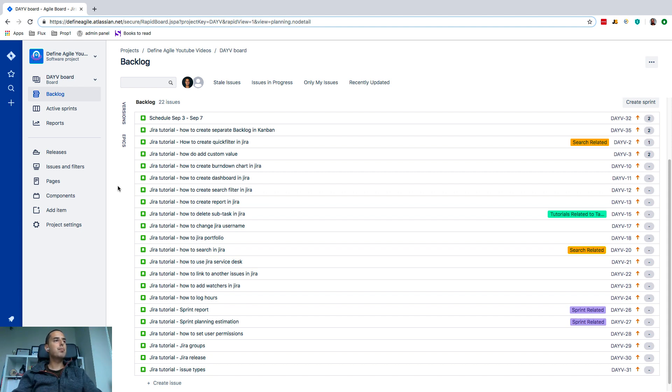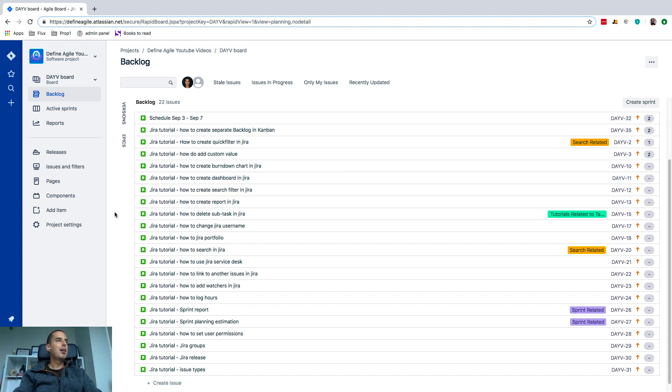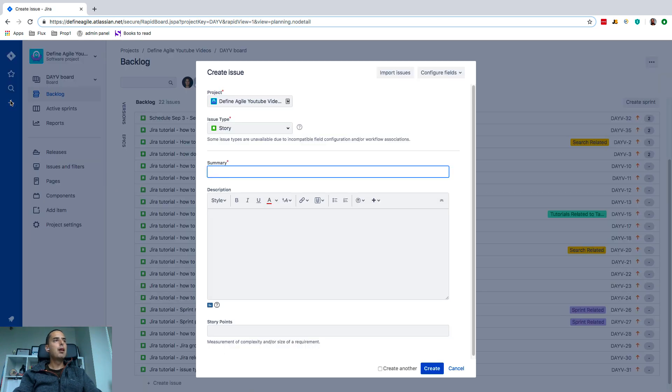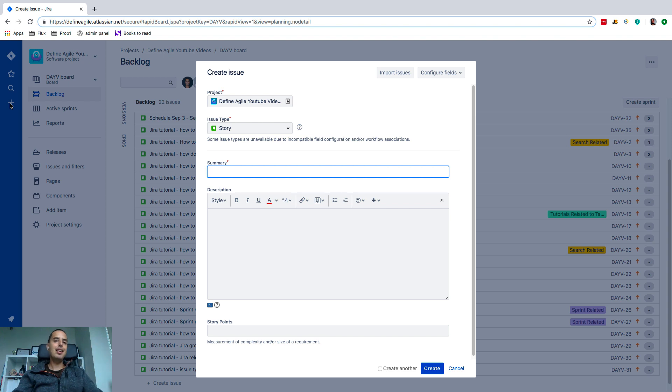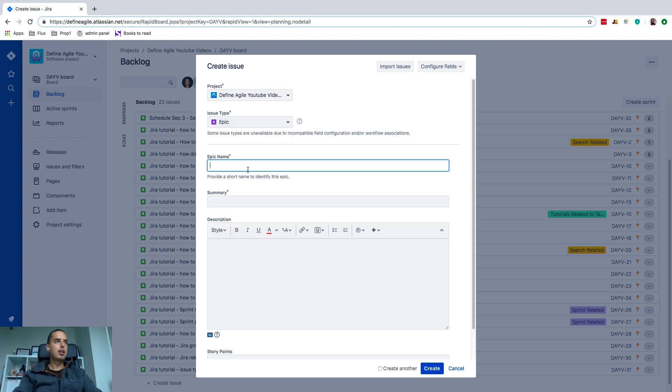Let's say I want to group my Jira tutorials by particular topics. So for example, I want to group all the dashboard-related tutorials together. For this I have one ticket here, there's probably more than that. But let's create an epic. To create an epic I click on the plus sign as we are doing with any thing that we want to create, and then we click on issue type and select epic.